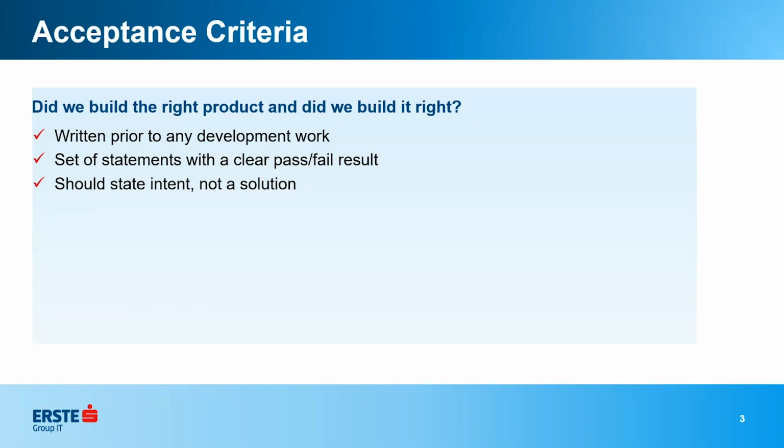But when you put it in writing, in the story, in the acceptance criteria, that leaves you very little wiggle room, because I'm sure any of you who have been doing IT long enough think you have a solution and you start working and realize we can't do it this way, we have to do it another way. And if it's already written in the acceptance criteria, this is the way it has to be done, then you have to go back and change the story.